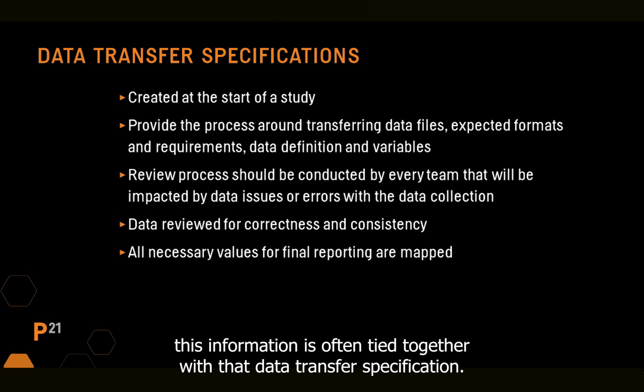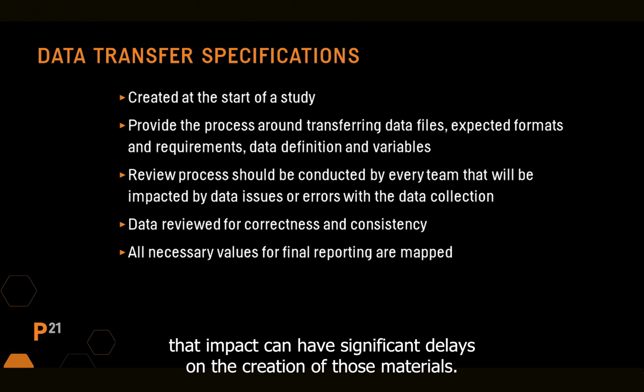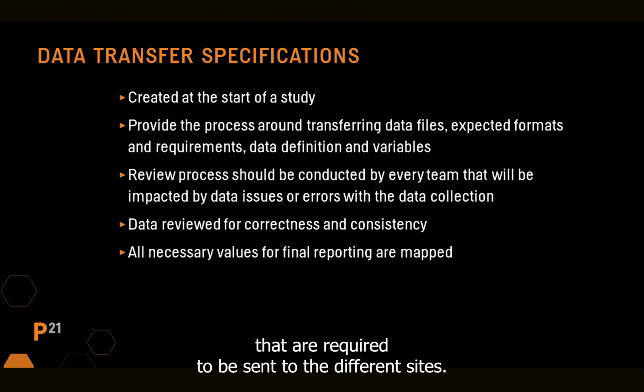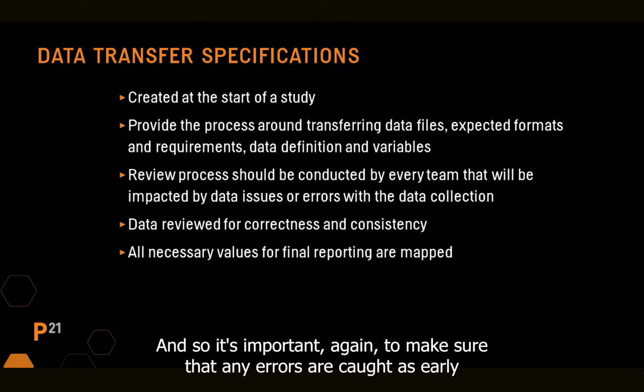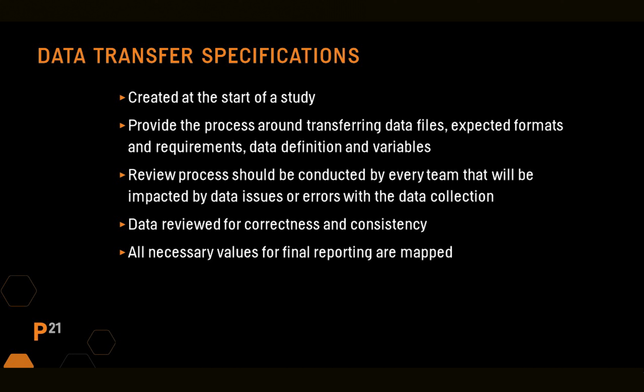And all this information is often tied together with that data transfer specification. If something happens where a visit is missed or a visit is added and there's a change, that impact can have significant delays on the creation of those materials. It typically takes 4 to 6 weeks to create all of the various collection kits that are required to be sent to the different sites. And so it's important, again, to make sure that any errors are caught as early as possible to reduce the delays to any kind of study startup.